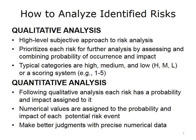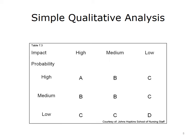Quantitative analysis assigns numerical values for the probability and impact for each potential risk event. This slide shows a probability matrix for a qualitative analysis and provides a way to understand how impact and probability relate to each other. The risks have been ranked as low, medium, and high for both probability on the left vertical axis and impact on the top horizontal axis. Based on how the probability ranking and the impact ranking intersect along the matrix, you would assign the risk with the letters A, B, C, or D in order of priority.